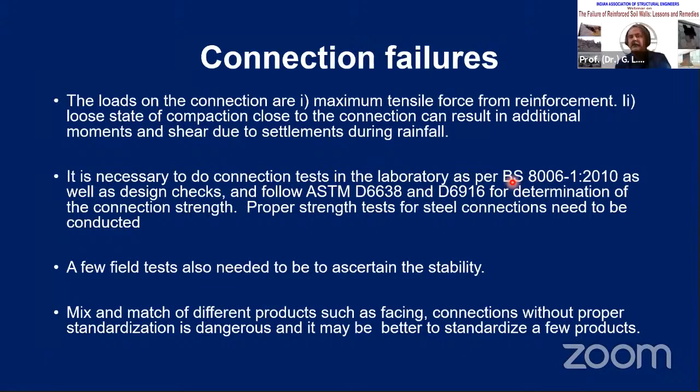Of course, some companies have come up with their own connections, and they need to make sure that their connection strength is perfect in all conditions. That may be necessary. A proper strength test, even for steel connections, needs to be established and done, maybe both in the lab and in the field, because sometimes we don't know. Somebody can have a quick test in the field. In fact, we did it 20 years back, a long time ago. The mix and match of different products, such as facing and connections, without proper standardization is dangerous, so it's better to standardize a few products.